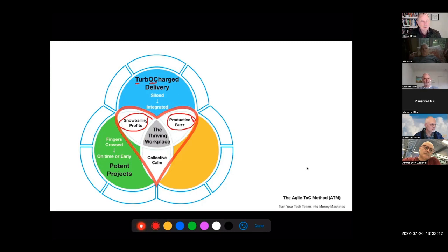There was a company in Edinburgh where I used to work. They built a component that got into one of the early iPhones. And then for the next release of the iPhone, they were three weeks late on their project to produce the component for the cutoff for Apple to put it in their next iPhone. And two years later, that company had gone from soaring financially, a huge success, to being bought out by a competitor. So delivering stuff on time is really important.